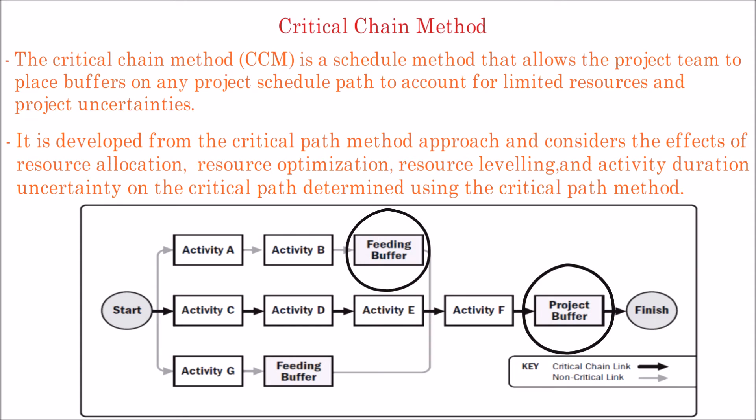Consequently, instead of managing the total float of network paths, the critical chain method focuses on managing the remaining buffer duration against the remaining duration of chains of activities.